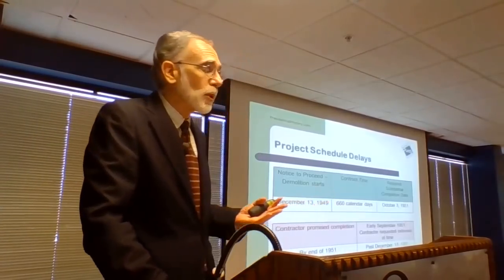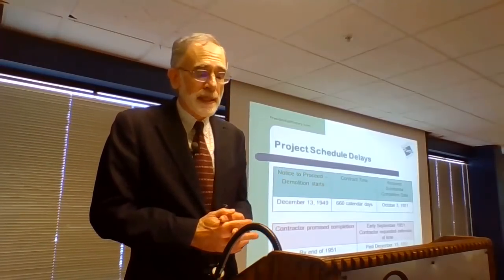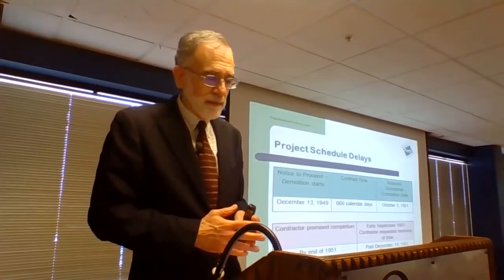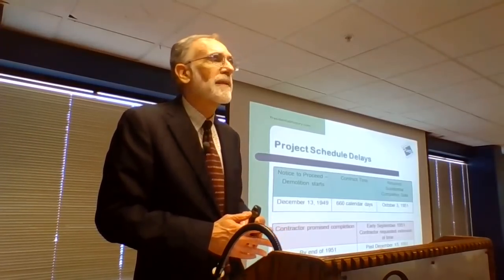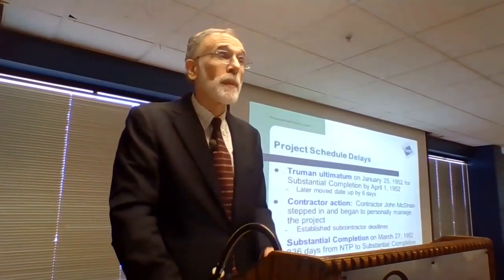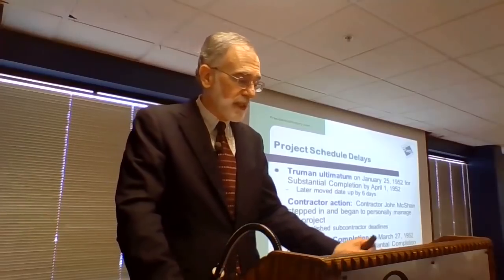So when we look at the schedule, they're given the notice to proceed in mid-December 1949. They're given 660 calendar days to do the work, meaning it should have been done by October 1951. The contractor promises completion by the end of 1951, and then he says, oh, it's actually going to go beyond that even. Truman was getting pretty frustrated living in the Blair House and with the slowness of the project, and so he issues an ultimatum in late January, and he says the project will be done by April 1st.